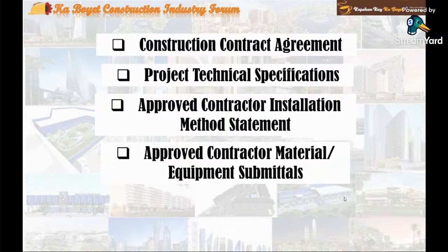Number four, the contractor approved material and or equipment submittals. This consists of information provided by the contractor to the design consultant for approval of equipment, materials, etc. before they are fabricated and delivered to the project.